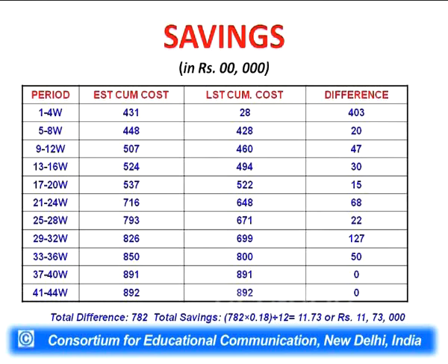When we are using LST, the project manager has to be very careful so that things do not delay, because he is using late start times. At the late start times, he hardly has a margin to delay the activity. So one has to be very careful and attentive while using late start times, but of course we have a lot of saving potential if we use LST times. Okay, the buzzword is now: use late start timings to save the cost.